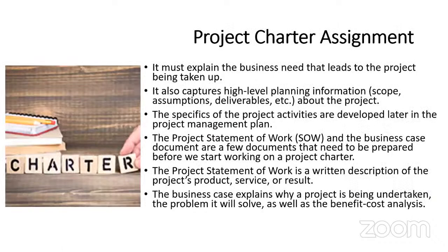Project charter purpose. What's the purpose of a project charter? What functions does the project charter do? It must explain the business need that leads to the project being taken up. It also captures high-level planning information like the scope, assumptions, deliverables, and so on about the project. The specifics of the project activities are developed later in the project management plan.